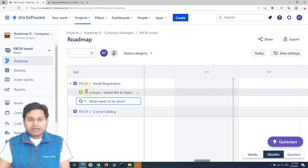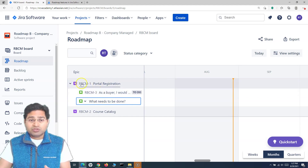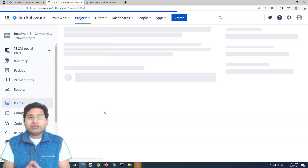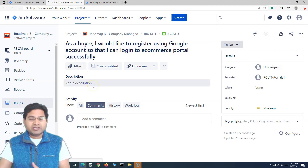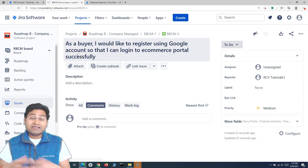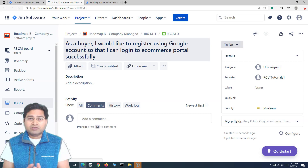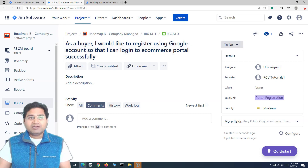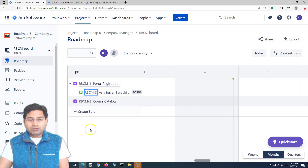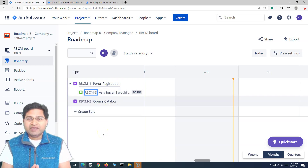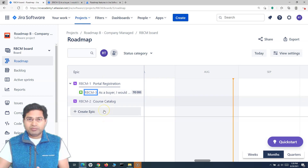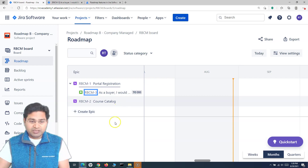Once the story is created, it contains basic information. If you open the story, it won't have all the relevant details yet — description, acceptance criteria, definition of done — those need to be populated later. As a product owner or product manager, you're planning the high-level epics and stories. Once you're done with the basic level of planning, that's what your roadmap will look like. Let me quickly add all the stories below both epics.